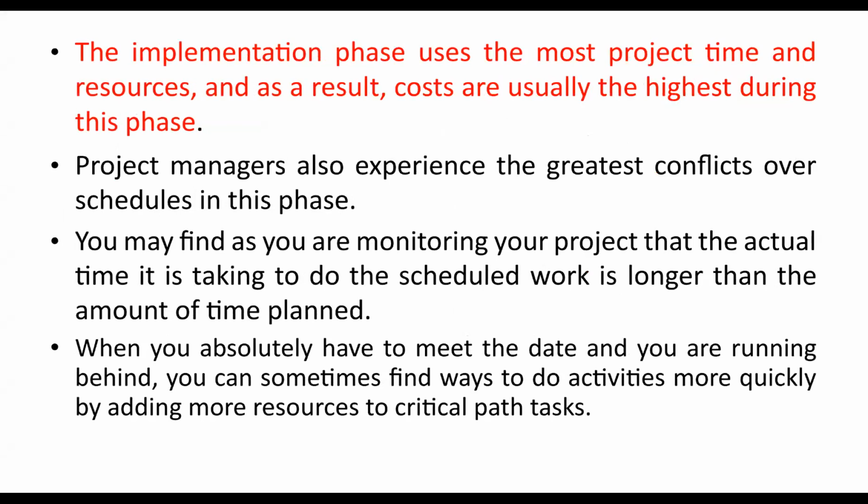Now, when it comes to the issues of the implementation phase, the implementation phase uses the most project time and resources. As a result, costs are usually the highest during this phase. Project managers also experience the greatest conflict over schedules in this phase.